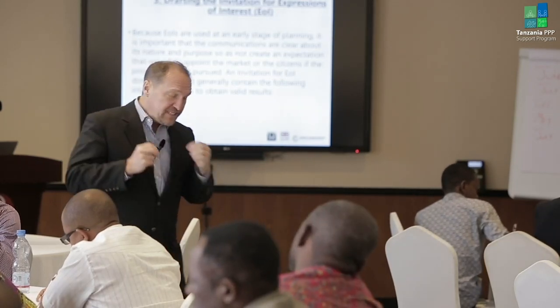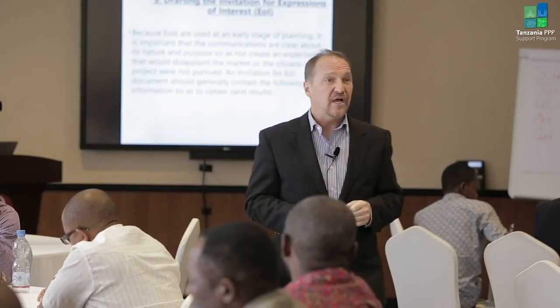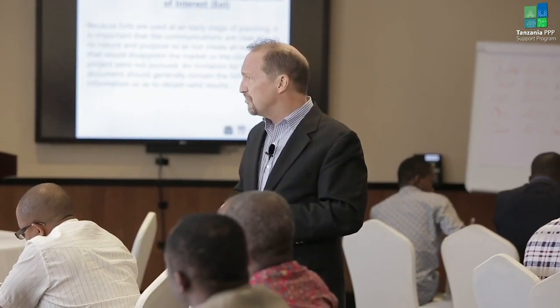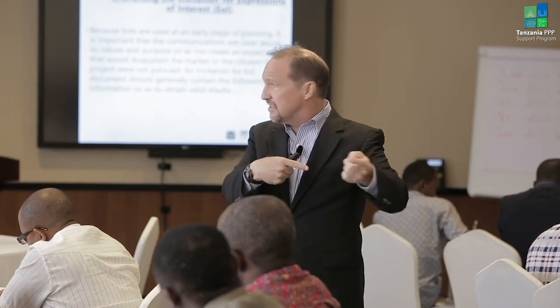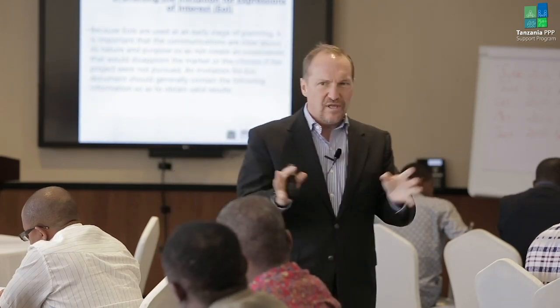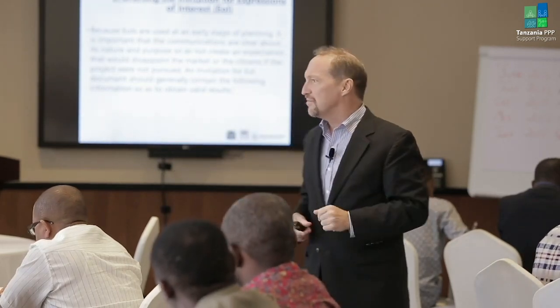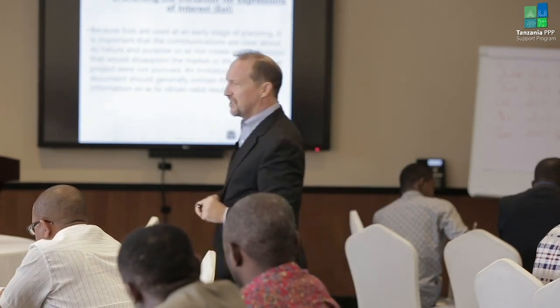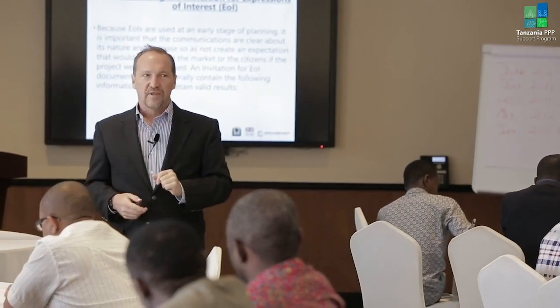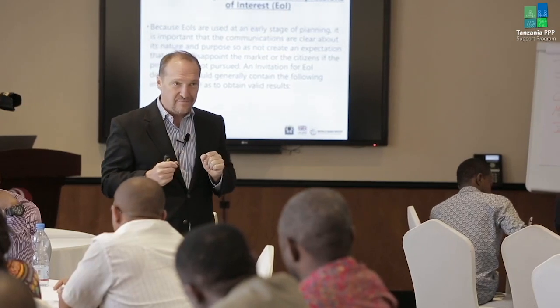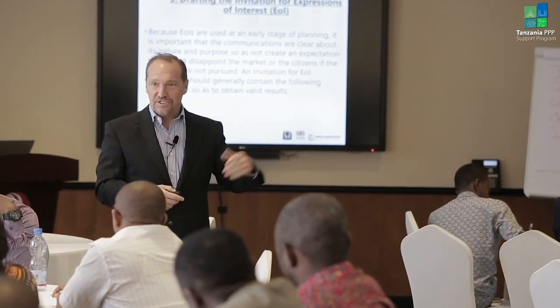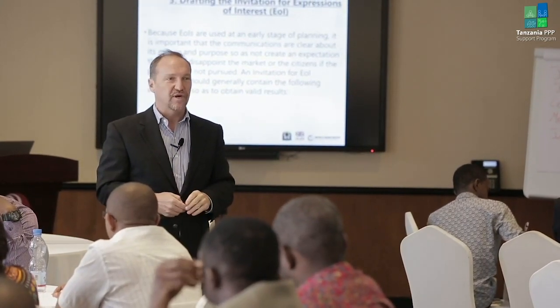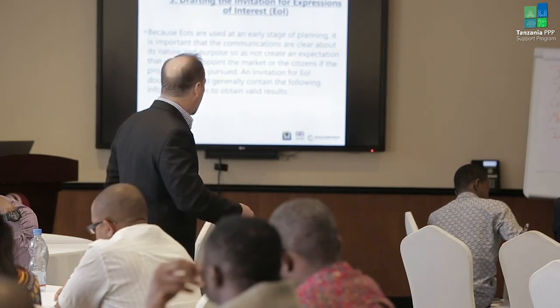Okay, on the downside, it can take more time. I've worked with contracting authorities before who are in a hurry to start the tender process, and so they say, Ned, write the RFP and let's release it. And I will say, well, let's first find out if there's market interest. No, that takes too much time. We need to go. Let's hurry. So on the downside, it can add an additional couple of weeks to the process.